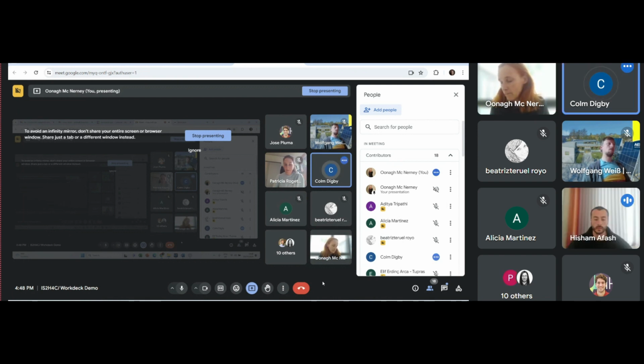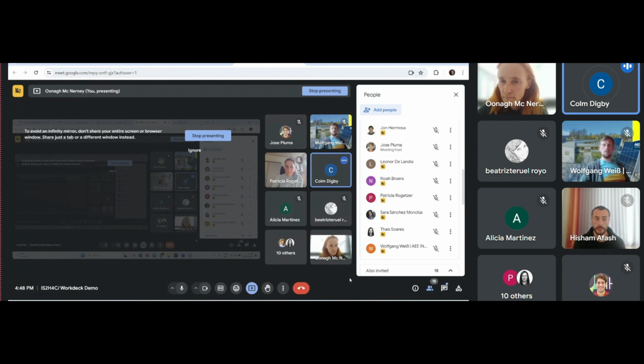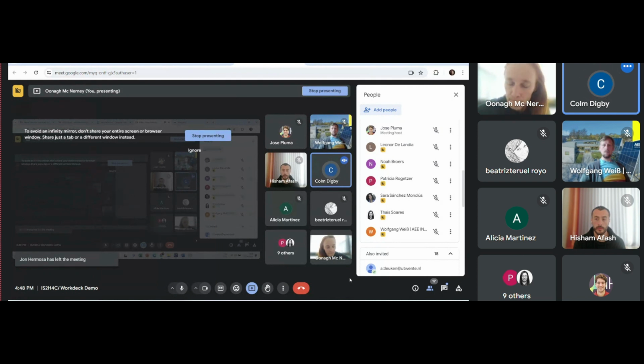The striped red lines just mean you've said you're going to spend 200 hours on this task, and once it turned red, you're going over the 200 hours. Or if you've planned to work on it from January to June, and you start working on it before that or after it, it'll appear in blue striped. So it'll let you know where you're deviating from the contractual norms. So if that's something that you're interested in tracking, it's quite easy to do in the platform.